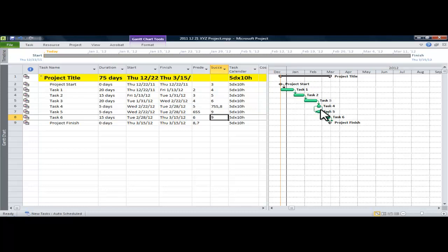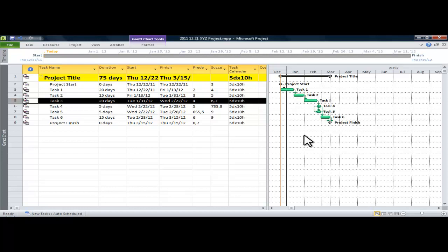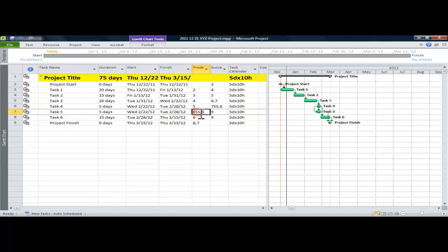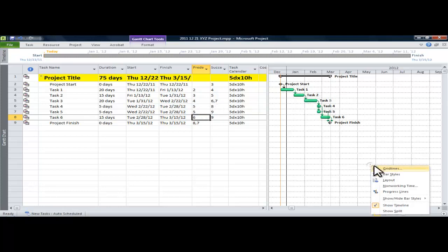I just want to be sure that all the activities are linked to the start and somehow either directly or indirectly related to the start and finish milestones of the schedule. I don't want any open ends in the schedule because every activity has the potential to delay the finish of the project. So this is good scheduling, just to make sure that you have all of your ends tied up in the schedule.